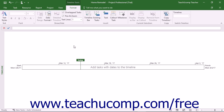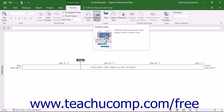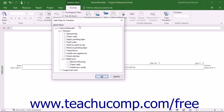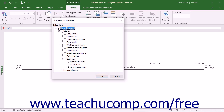While you can click and drag tasks from the Gantt chart view into the timeline above it to add tasks, you can also more easily add existing tasks to the timeline view by clicking the Existing Tasks button in the Insert button group on the Format tab of the Timeline tool's contextual tab in the ribbon. In the Add Tasks to Timeline dialog box that appears, check the checkboxes next to the names of the tasks to add. You can check the Project checkbox to add a task representing the duration of the project file to the timeline if desired. After checking the existing tasks to add, click the OK button to add them to the timeline view.